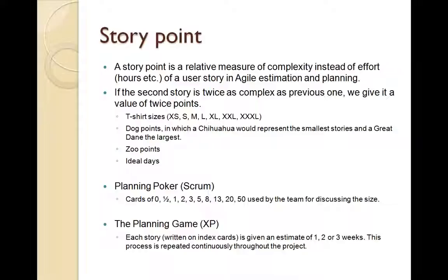There are similar analogies available related with that, which is t-shirt sizes. Which means if a person that I'm looking at has a t-shirt size of medium, a medium size t-shirt fits him, then if I see a next person who is much thinner than him, what is the t-shirt size that he would require? If I'm looking at a person who is much fatter, then what is the t-shirt size that he would require? So based on that, I try to arrive at a t-shirt size.